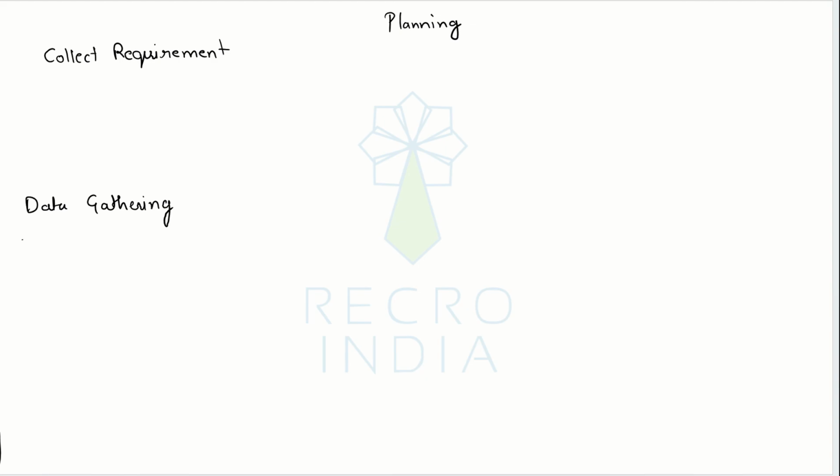So coming back to data gathering techniques, starting with document analysis, we can look into some of our project's existing documents like project charter, business case, benefits management plan, which we already have, or you can say that these are the existing documents in the project that can help us to decode certain high level requirements that already have been documented as part of these existing documents.